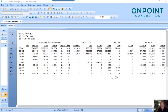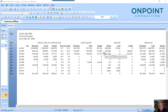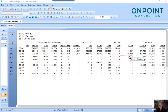As I look at this report and go across these jobs: on job 03001 it's looking okay — I'm over-billed just a bit. The same thing with 03002. As I go across the next one, I'm under-billed, as I am on the one after that. I'd want to find out why — is that timing? What's happening there so that we don't continue that trend? There's something we can do to help whoever does the billing to get that more current.